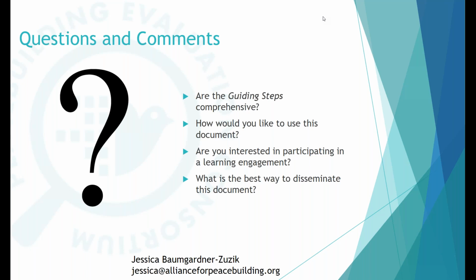For me, part of the key lessons that we're trying to reinforce around conflict analyses is that it's not a one-time catch-all. You may do it initially as you're working on your proposal or right after receiving a grant, in that more traditional framework. But as you move forward and start developing your M&E plan, before you even get to implementation, you should be reevaluating the conflict analysis. And I think those reevaluations can be much more targeted toward some of these key questions that you're asking, such as what is the goal of this organization? How does this relate to our theories of change? And additionally, during the monitoring, as I spoke about, being able to reevaluate the current context.